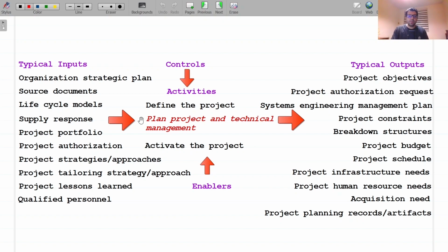Establish the roles and responsibilities for project authority. Define top-level work packages for each activity identified. Each work package should be tied to required resources, including procurement strategies. Develop a project schedule, for example, an integrated project schedule, a systems engineering master schedule, or SEMS based on objectives and work estimates. Determine the infrastructure and services needed for the project.